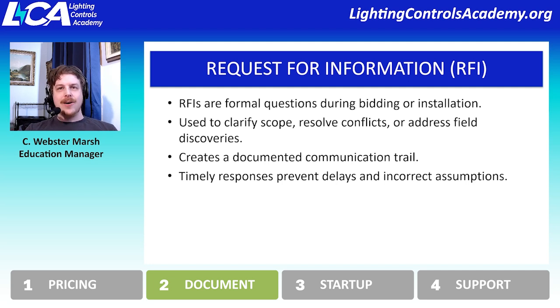Sometimes it takes a very long time to respond to an RFI, but making sure RFIs are responded to in a timely manner keeps the project on track for its schedule and helps avoid any assumptions that might be made.